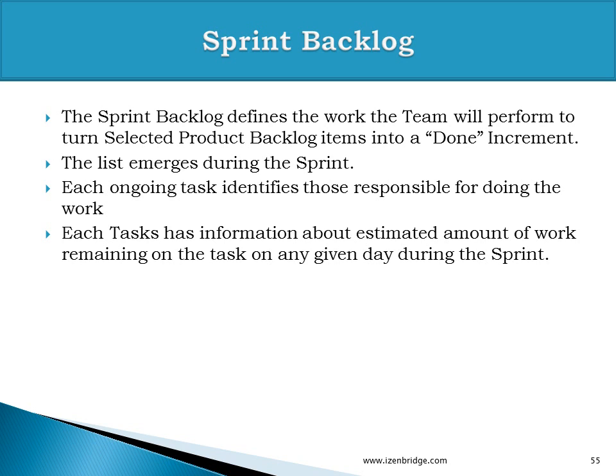The tasks which are in progress should have a responsible person assigned to them. So all the tasks which are under development or in progress should have a team member assigned to them. Now each task should have information on how much time is left remaining in order to complete that particular task. What does it mean?